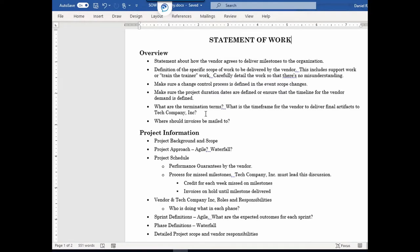That leads to the termination terms. If you're completely dissatisfied with this vendor, there has to be some sort of clause where you can terminate the contract with very limited impact to yourself. You'd need to work with your legal or procurement department to confirm this with the vendor, and it has to be very detailed out. You also have to understand what the timeframe is for the vendor to deliver artifacts, and what the impact will be if they are late on milestones — for instance, will the vendor not charge for a certain percentage of that milestone?